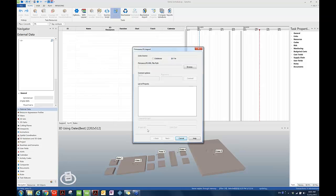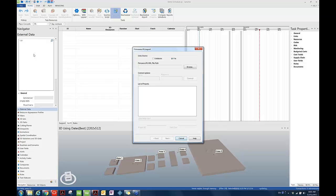If the schedule is updated in P6, the P6 user should export a new P6 XML file, then the Synchro user should use the external data synchronized from command to bring the changes into Synchro. Also, the second synchronization from Primavera P6 can be accomplished via the P6 API connection. Prior to version 5.1, Synchro already supported and still supports synchronized from directly from the P6 database via an API connection. The Synchro user must have the API installed and configured locally and be able to access P6 either locally or via a remote connection.